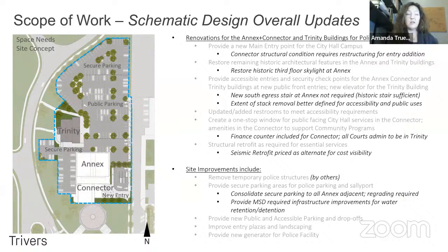Site improvements is another area where we have a lot more development. Our previous study was really a pretty straightforward, almost graphic overlay of maximizing parking counts and things like that in the parking. We've learned a little bit more about best use for the site, including best location for some of the secure parking areas. So there were some adjustments to the site that move some things around, and I'll talk through what that means for numbers. We also learned, through our civil and landscape designers, about some of the other requirements that are going to be required by MSD or some of the other construction and regrading that we're going to need to do on the site.